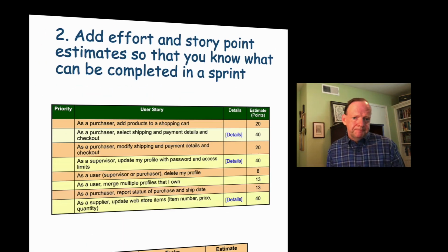The first picture shows you a regular user story backlog or product backlog and a relative estimate of size on the far right hand picture in terms of points, where 40 would be a large, complicated user story, and 1 or 2 at a lower end, or 8, would be a simpler, easier user story. It's a relative range of a scale to kind of show you what is difficult and what is easy so you can better prioritize and figure out the schedule for that work.